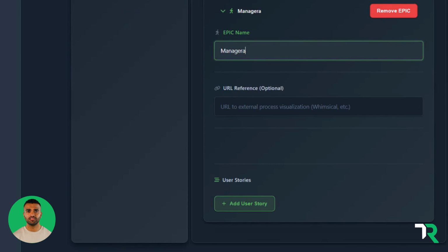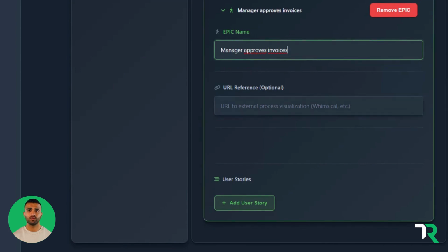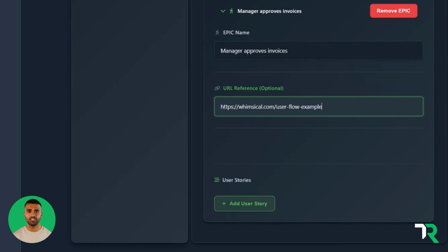In most cases, visualizing the steps creates clarity about the journey. Use cases then test these epics in different situations, ensuring the path still works under varying conditions, like when an invoice comes from a foreign supplier. To keep things manageable, aim for the 80/20 rule, support the most common cases now, and leave edge cases for later.